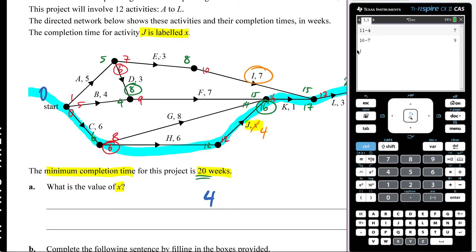What else could I bump up? What about E? E has a float time of seven minus five. Seven minus five is two, so E could be bumped up as well. What else could be bumped up? Now F has a float time of nine minus eight, so that's no good. Nine minus eight is one. I couldn't bump it up.